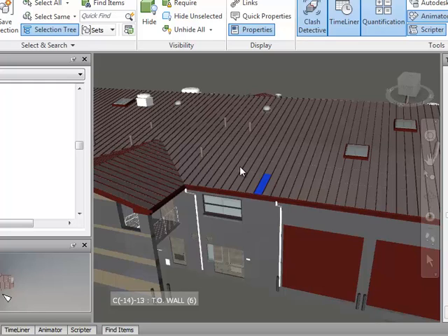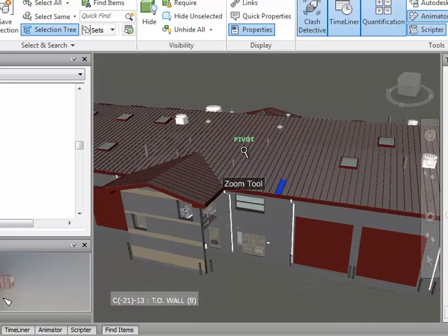When you were asking about the door, you didn't ask about the cabinet. No. The cabinet doors belong to the cabinet. Correct. Typically we don't take off the cabinet doors, and they may be modeled separately. Maybe the architect did that, but we would just want to know the lineal feet of cabinet.